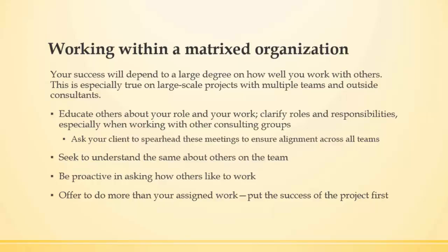So what I typically would like to do at the beginning of a project, if I find myself in this situation, is ask my client to set up a meeting with the key people from the project team. And we have a kickoff meeting and we'll say, here's what I'm here to do, and help me understand each of your roles and responsibilities. Here's my objective.